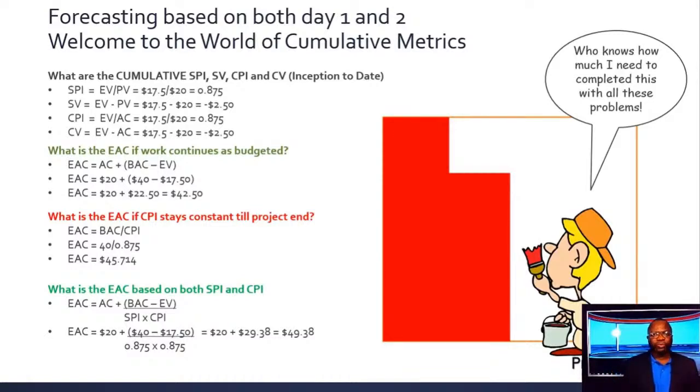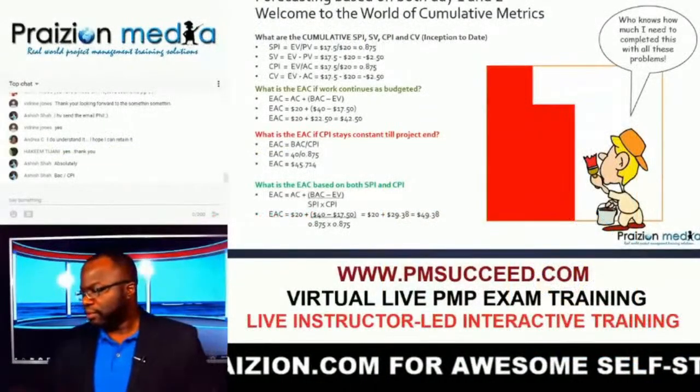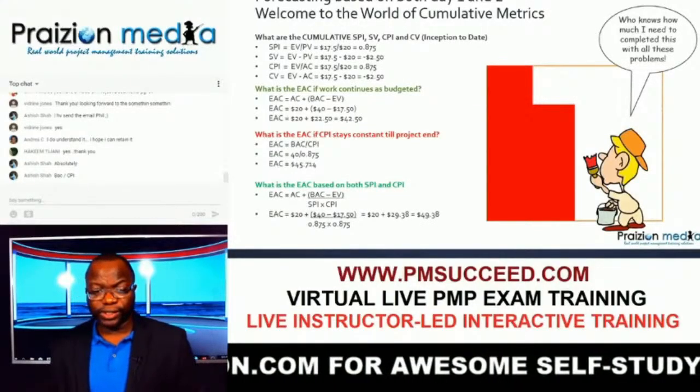All right. So I think one last thing to give you a very good perspective is the final formula. And the final formula is, what is the EAC if your budget at completion number doesn't even make sense anymore? Then that means we need to do a brand new bottom-up ETC. See that? So let me show you what this means. What happens if everything that I budgeted in the past makes no sense anymore and I need to come clean and say, management, I blew it, I got it wrong, I'm going to do a brand new estimate? What do you do? You do a brand new estimate.